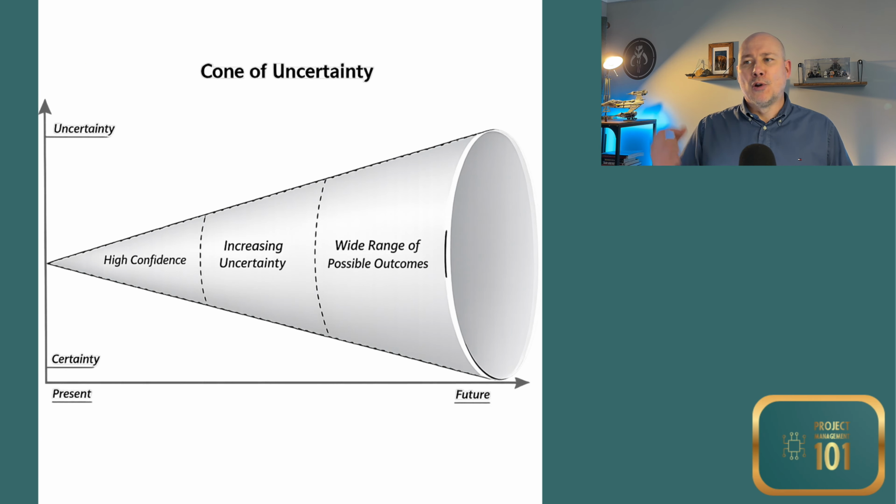So taking that principle, and I'll pop an image up on the screen of what that looks like. The things that are closer should be more well defined versus the things that are further away should be less well defined. As a Scrum Master, it's our job to make sure that we're working with the team and facilitating the conversation to the right level of definition, and we can use that with definition of ready, and then we can challenge when we're going too deep, going down rabbit holes on things that are 6 months away. It's not important for today's conversation unless there's a critical architectural dependency, in which case we want to talk about it and bring it out earlier and make sure it's higher up the priority list in the backlog.